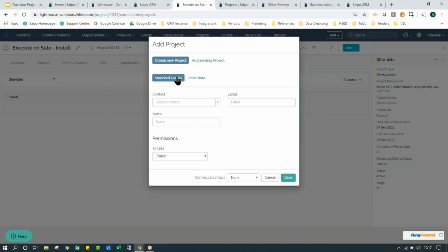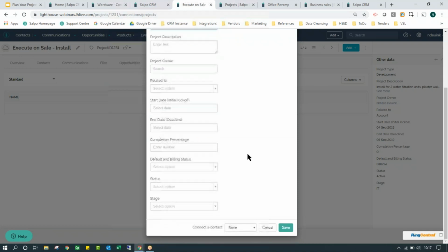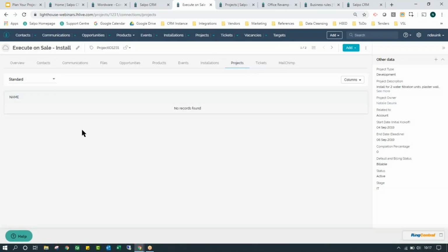One way of doing that is connecting this project, and I'm now creating a dependency. So if I wanted to create this as a new project, when I'm filling out those other data, this project type could be, again, like IT or design development, and pick that, but I'd have another drop-down field option that might say dependency or master. And that information would just be stored there. So then when I come to this master project or the epic, I would see a list of all of the different projects associated underneath of it.